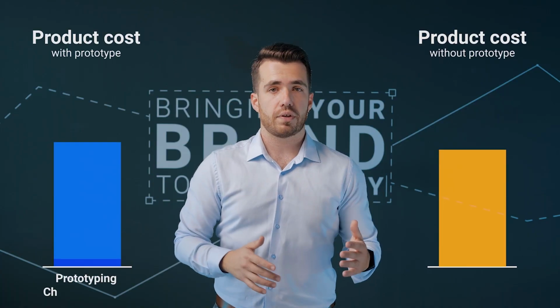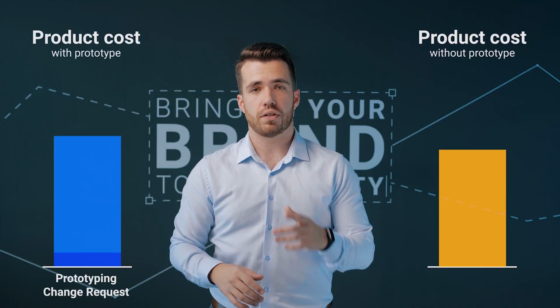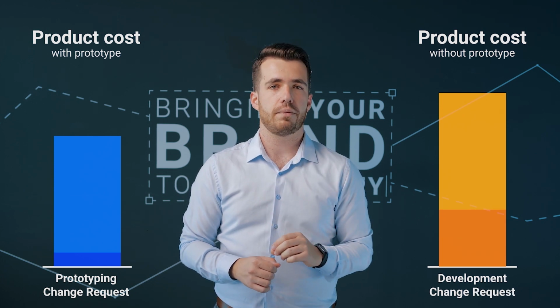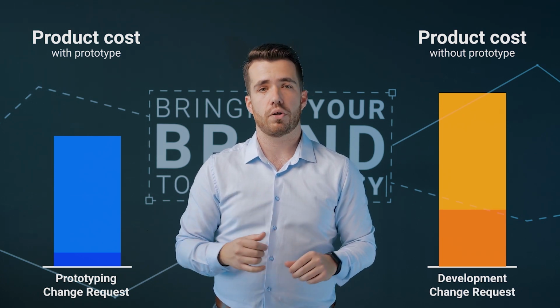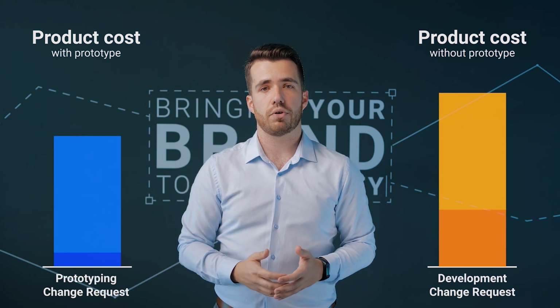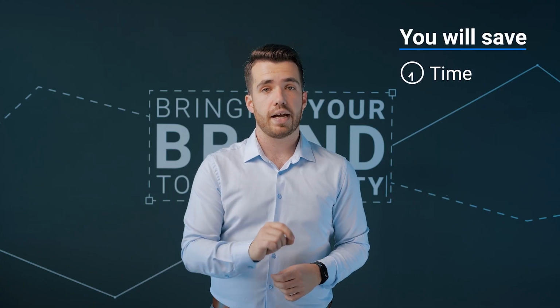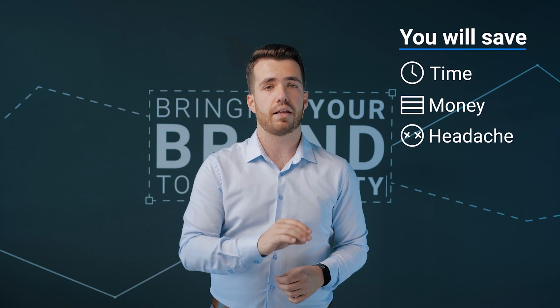If you leave out prototyping and start asking for changes in the development phase because you imagine that the UI would work differently, well, then you should count upon having extra work hours, and that will increase your estimated costs. After all changes have been approved and everybody is satisfied with the prototype, only then I would recommend to start developing. It will save you time, money, and a lot of headache down the road.